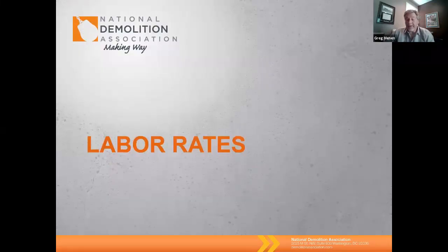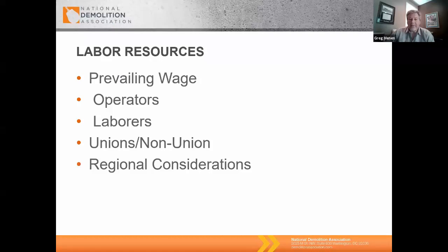We talk about the labor rates. Why do we talk about labor rates? Because we get into the idea of prevailing wage, the unions, non-unions, and then regional considerations. During the times when things got slow, a lot of people went outside of their area. It is always good to understand who your competition is, where they are, where they're going, and then understand the wage rates that are required. There's a significant difference between saying, hey, I want to go ahead and take a job in the state of Washington versus trying to do one in the state of Tennessee.